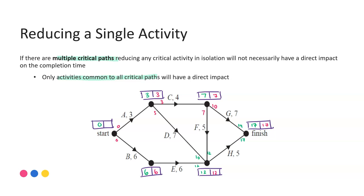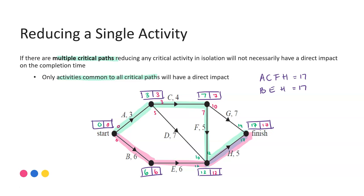Here I've done the forward and backward scan on this graph, and we can see from the start there are two options where I had the latest start time of zero. The first critical path: travelling along A, then C, then F, then H — that's critical path A, C, F, H. The second critical path: travelling along B, E, and also H — gives the same completion time of 17.